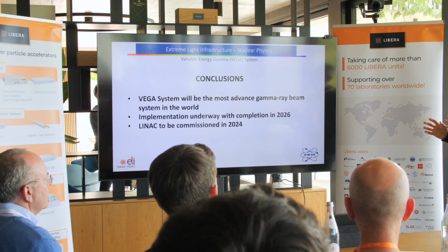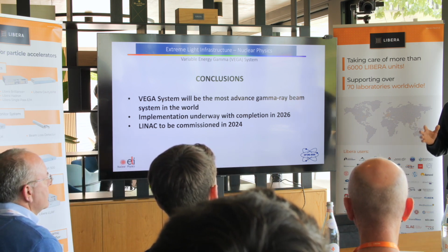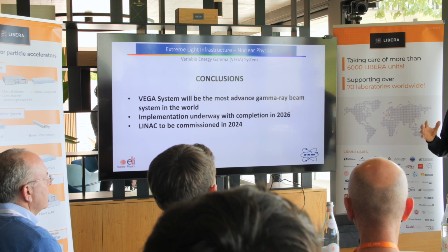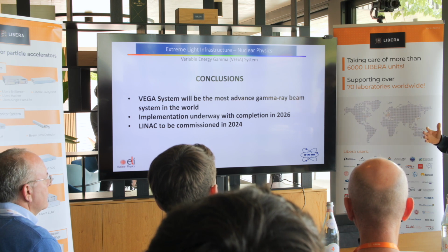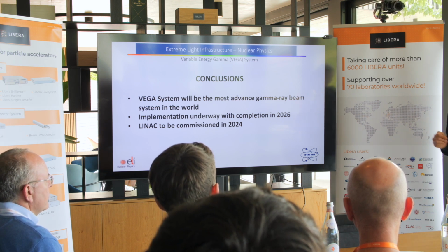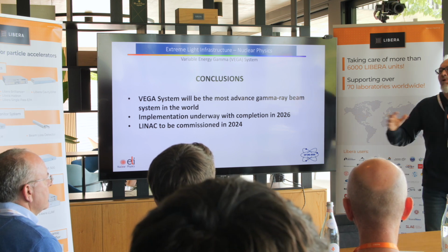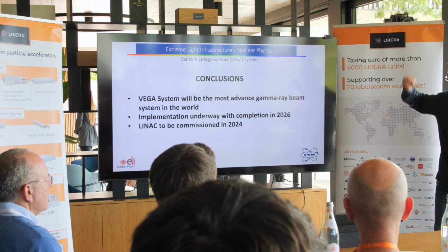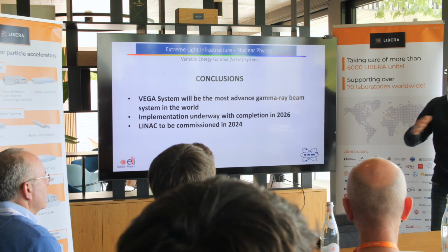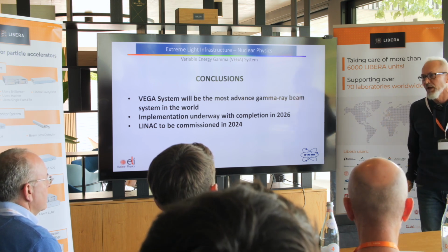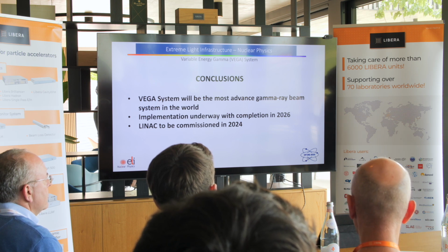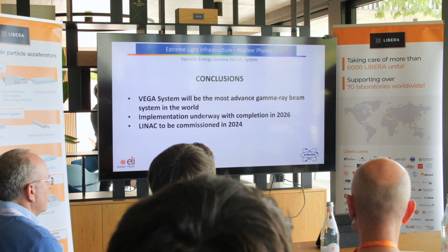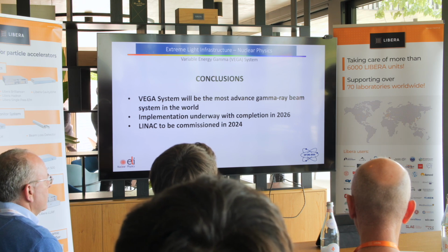We need some kind of fine-tuning assistance. We are going to do the rough tasks ourselves, but for the fine-tuning, before performing the commissioning, we need the company to check and confirm that everything is 100% well done. So we are a little bit delayed with these companies which are going to assist us to finally commission the equipment.